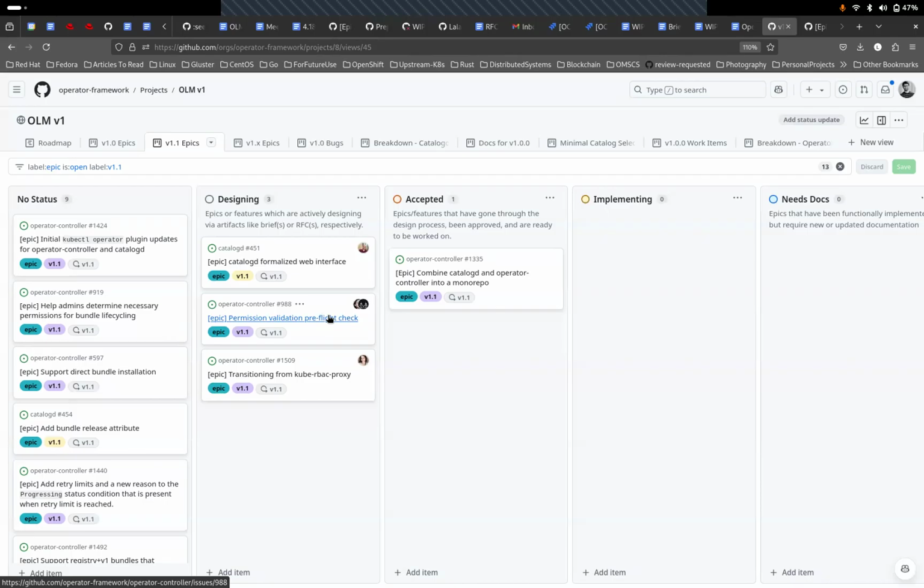But that makes me have another thought, which is, should we just release train this stuff and say we're going to take the stuff that's highest on the list and we're going to have time-based releases, and whatever we merged in the last X weeks is what goes into the release? I wonder if putting 1.1 labels on here is actually just confusing things. Let's just do the topmost things, and then that's what gets in the next time we do a release.